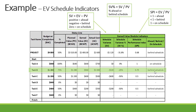The same calculations can be done for tasks A through F as well as for the project. At project level, schedule variance = EV − PV = −$1,120. Schedule variance percentage = −$1,120 ÷ $3,520 = −31.8%, meaning the project is approximately 32% behind schedule.